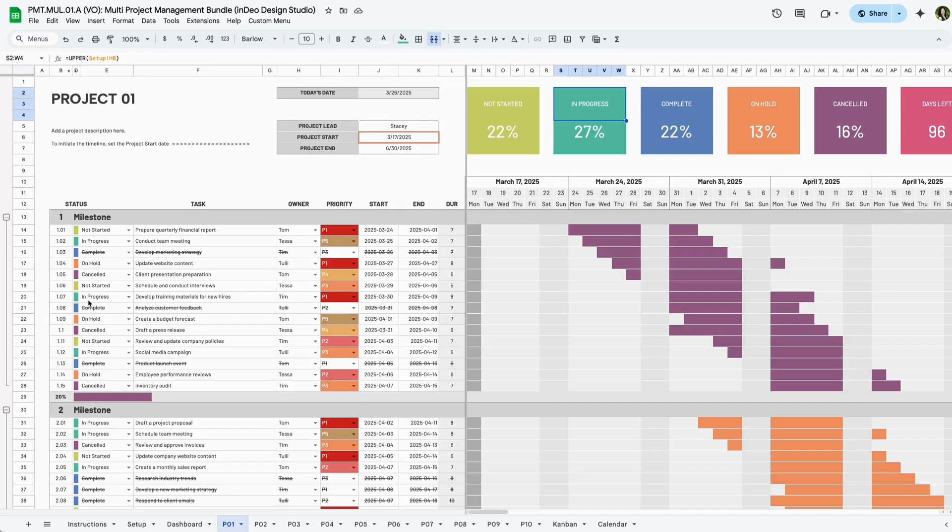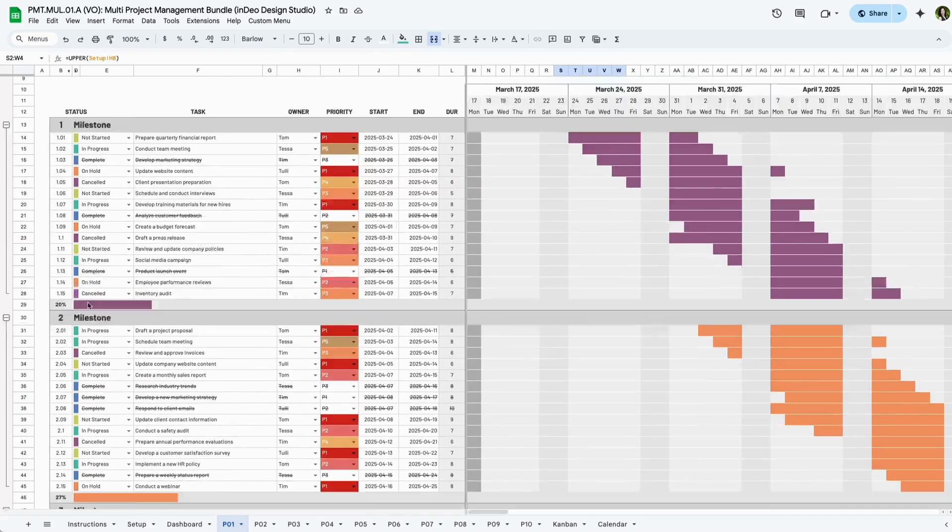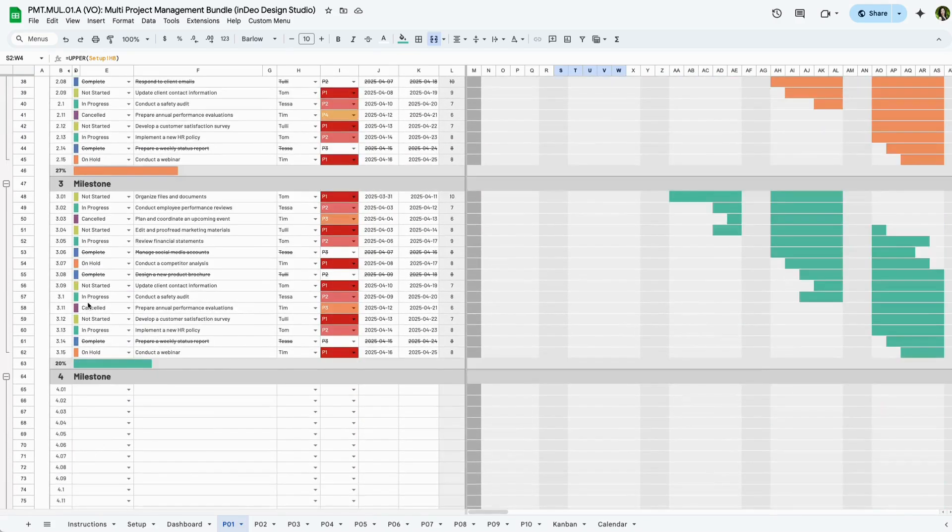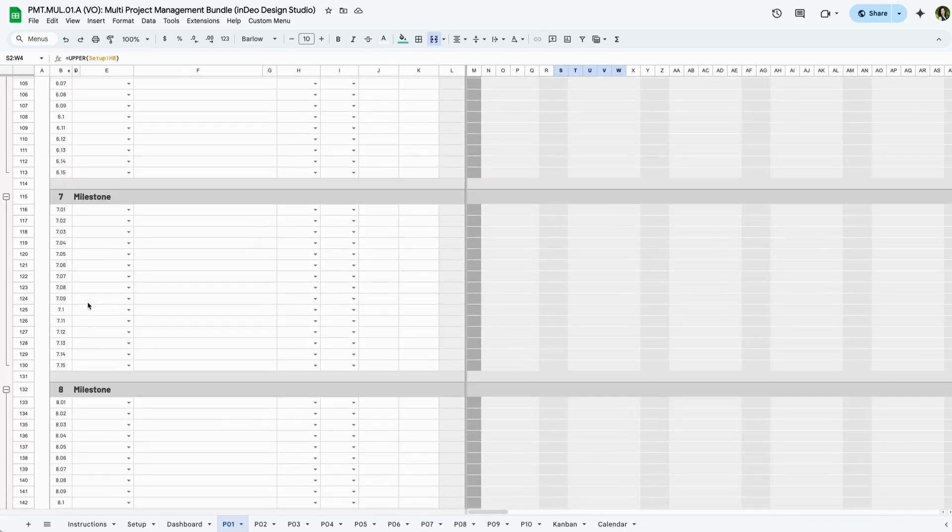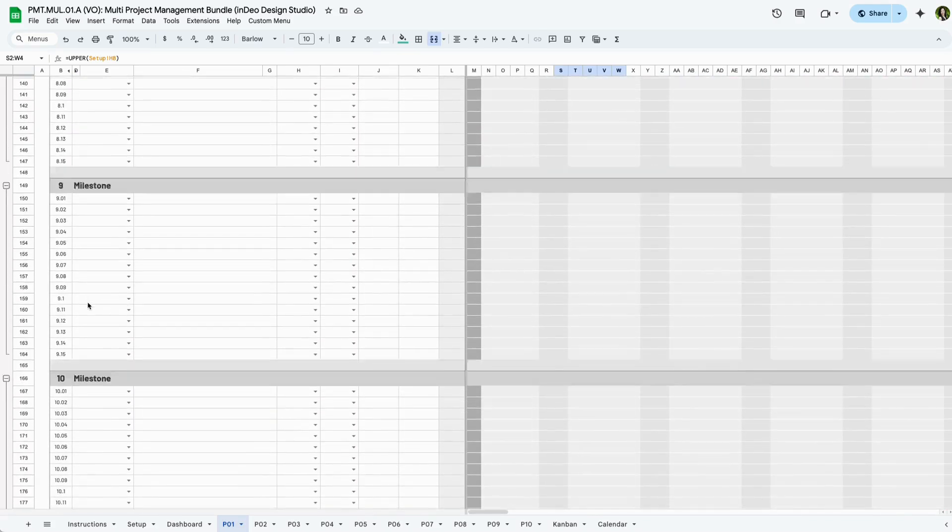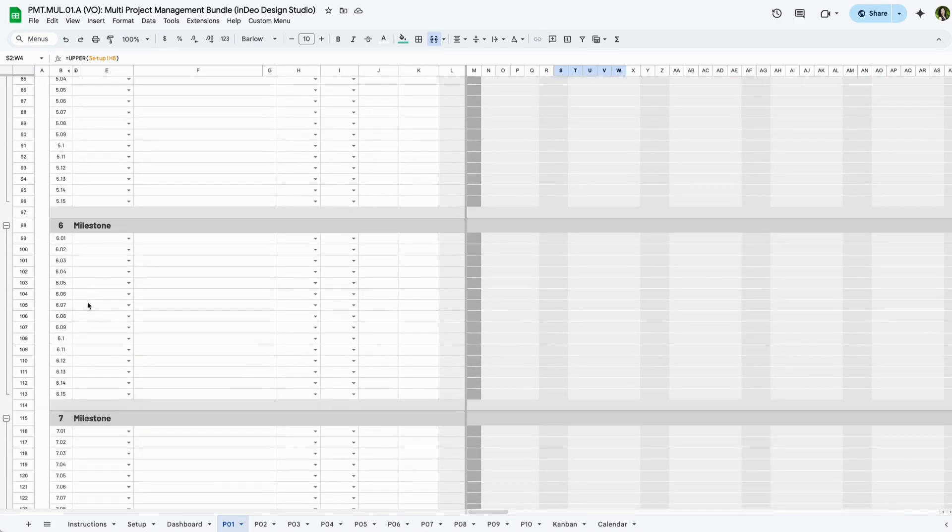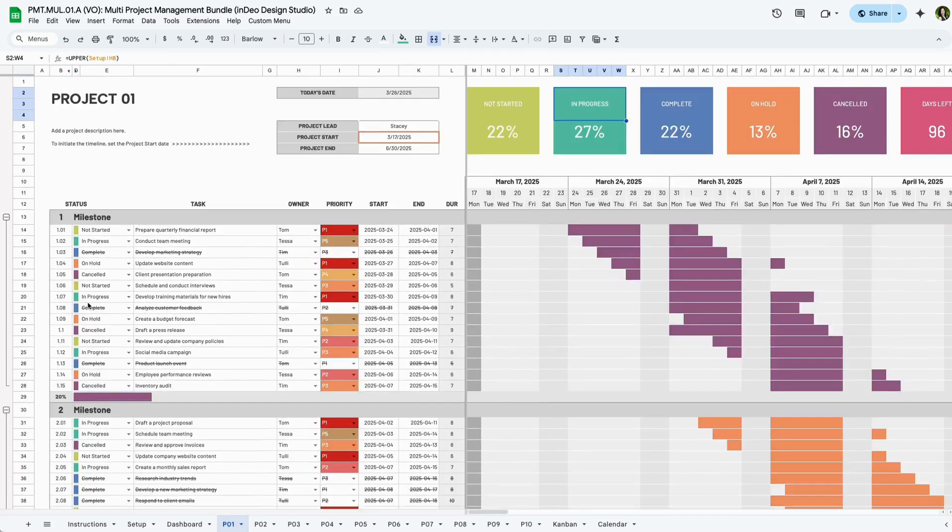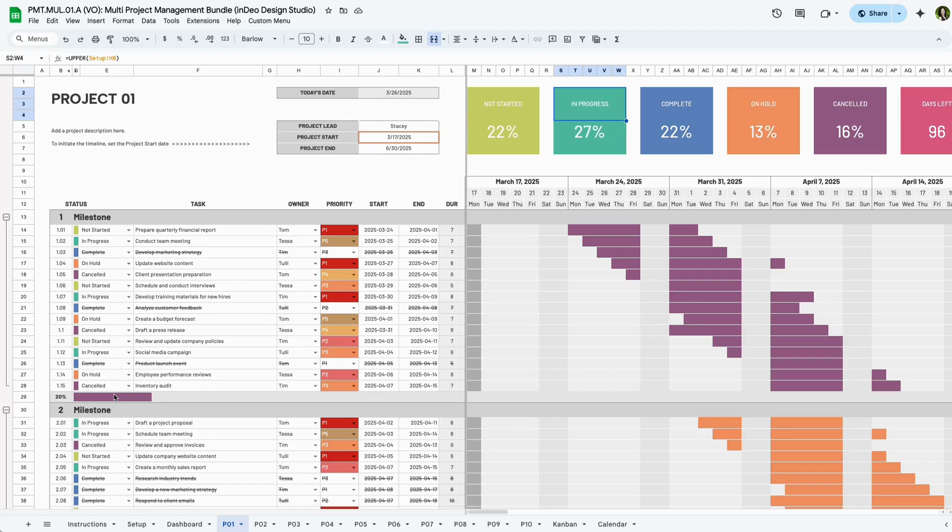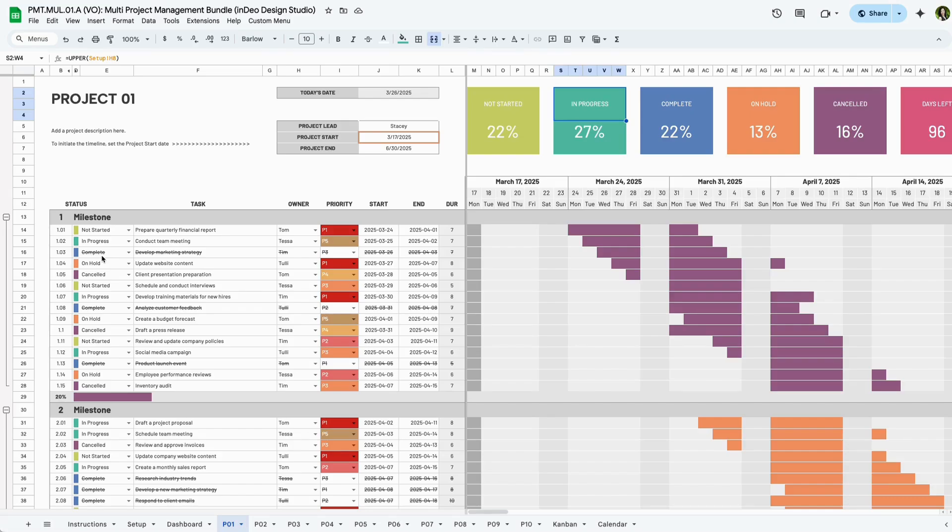In the task table, you can break your project into up to 10 milestones, and then you can add up to 15 tasks within each milestone. Set each task's status, priority, owner, and timeline, and track the duration automatically. When the task is labeled complete, it will be crossed out in the table.